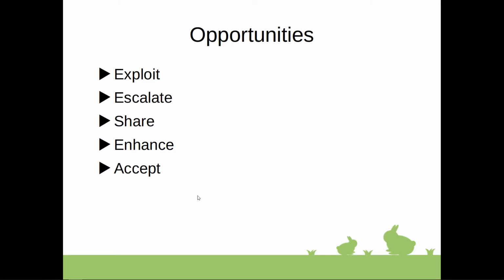Share. Opportunity sharing involves allocating ownership of an opportunity to a third party, similar to transfer in terms of threat management. Essentially, you transfer the opportunity and share it with the third party who would be most appropriate to capture the benefit of that particular opportunity.